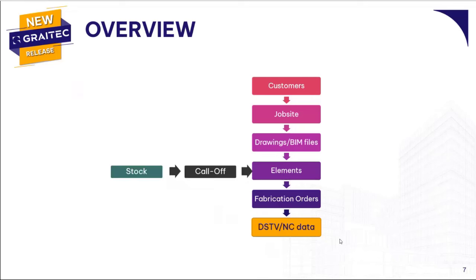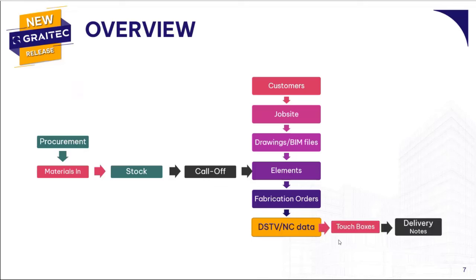To manage the elements, you need to verify if you have the raw material in stock to produce the assemblies. If not, we have a nesting module where you can verify how many bars or plates are required for the entirety of the fabrication order and then procure the material. In the 2025 release, you can manage this across multiple fabrication orders simultaneously — nesting each individual fabrication order and then grouping them all together for one single purchase. We can also drive NC data to the shop, link to touch boxes, and create delivery notes.